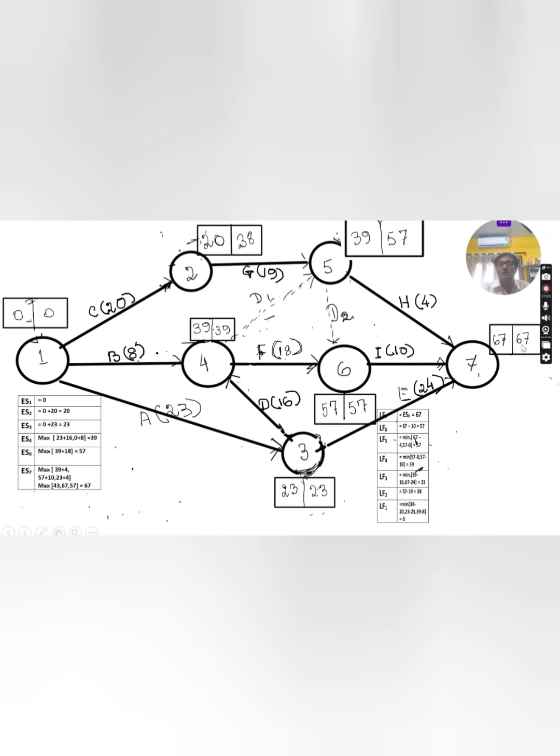That is the highest time allocated for the project in this way. Now come to the next point, fifth node. How many activities are coming out from this? 1 and 2, two activities. In this case, you have to consider the minimum value. Previous one, you have to select the highest one, but in this case, you have to select the minimum one, because after that, the required time for the remaining activities is required to complete the project. That's why the minimum time will take two activities.